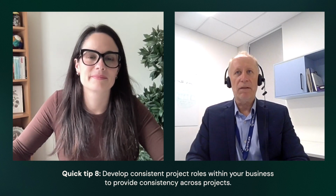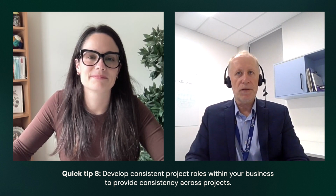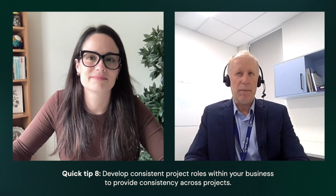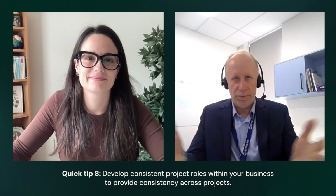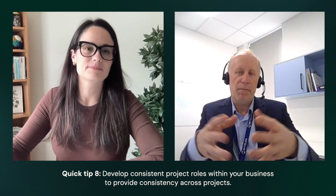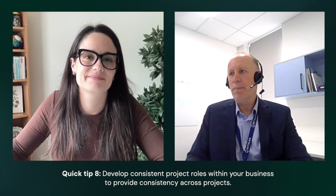I think it's important to rationalize and refine your project roles before bringing them into Bridgit. So we found we had many project roles that were essentially the same thing but called something slightly different. So we rationalized down and probably cut out 90 odd project roles because there was that overlap. So we have much less, but now there's a consistent look and feel from project to project.